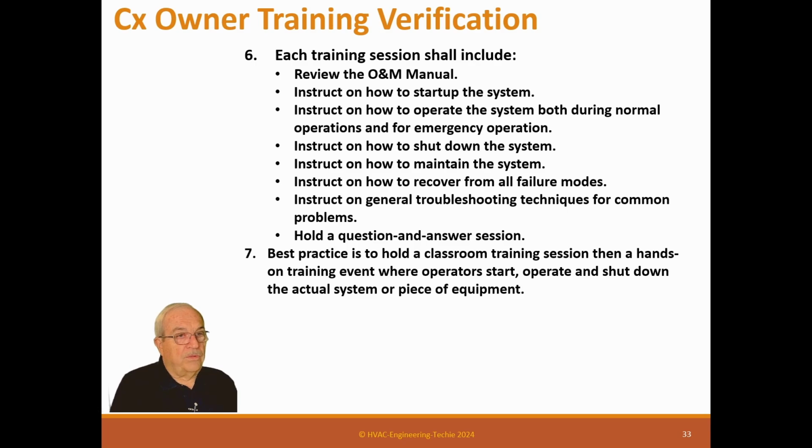Okay, before we go there, let's talk a little bit more. One thing, the owner needs to tell you exactly what he needs. What does his staff actually need? If he has 5 operators, he doesn't need to have all 5 operators go through a 2-day control class. I mean, he can, but really he should have 1, 2, or 3 technicians who are expert in controls. Those are the people that should go to it.